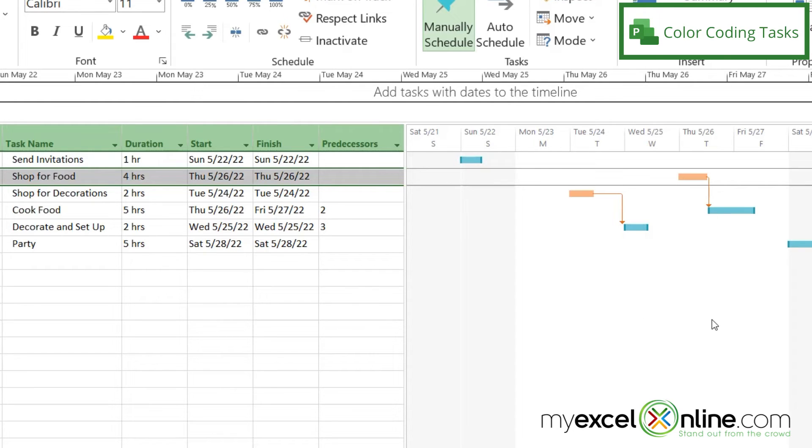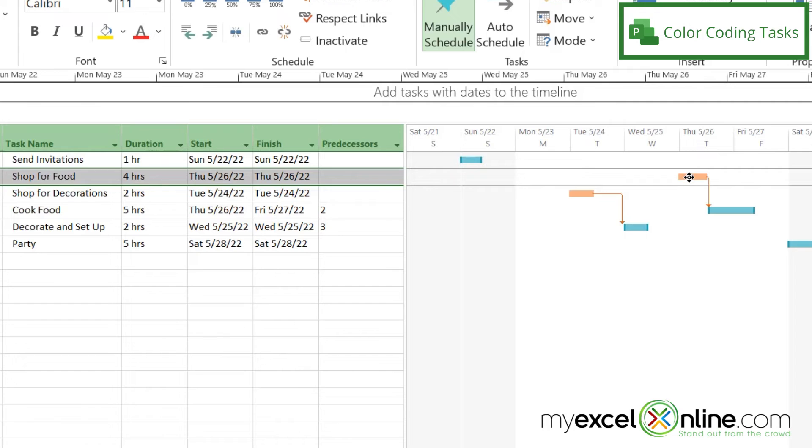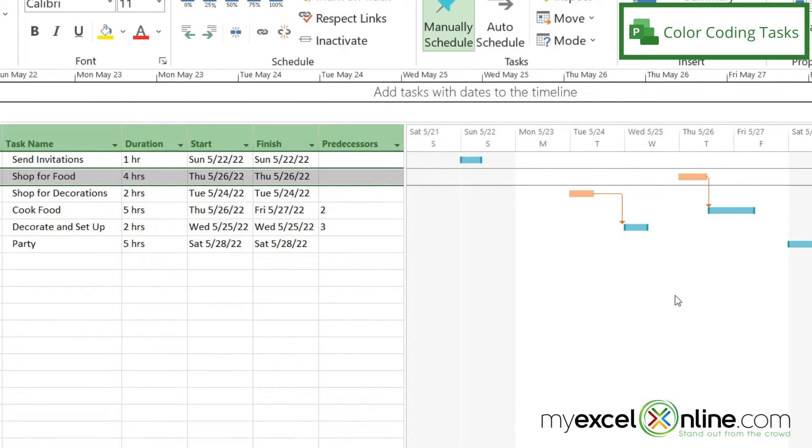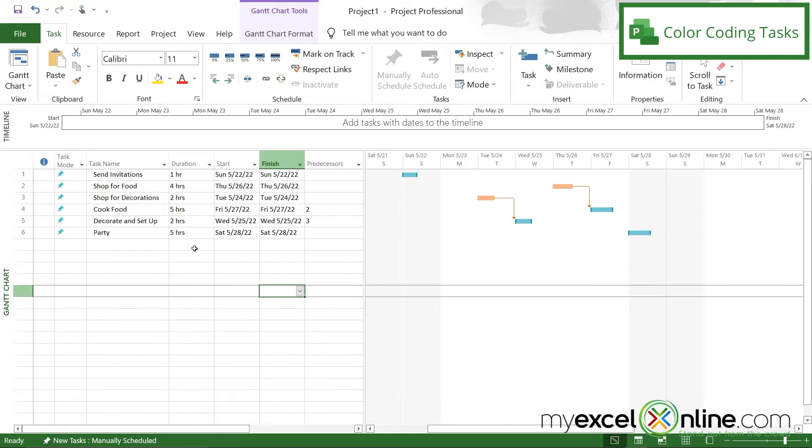And so maybe I could think about overlapping those tasks somehow. But if I do that, I'm going to have a lot of stress in the end of my week because I need to shop for decorations before I decorate, and I need to shop for food before I cook. And so shopping together might not be the best idea right here because I don't want to buy food too early because I don't want it to go bad. So I'm going to just leave things the way that they are.